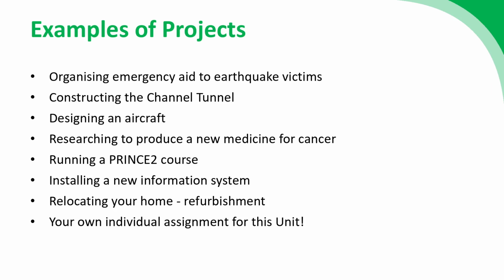Many projects, once they're finished, will transition or hand over, or deliver the ultimate good or product into operational use. So the construction of the Channel Tunnel is a project. Once that construction was successfully completed and the project was successfully over, then it was transitioned over to another organization that then actually operated it as part of their everyday ongoing regular operations.